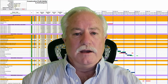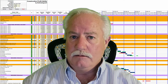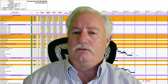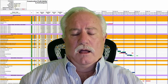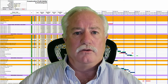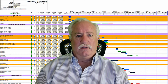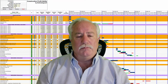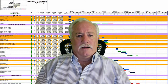However, we need you to understand that, if any revisions in the drawings come along, or if we get out on site and encounter any site-specific conditions that are going to require additional or different material, we want you to guarantee us the same pricing for those materials. We're not going to pay a premium because we changed our package. This is the markup that you're going to charge us through the entire project for all the materials in this classification, whether it's pipe and wire, light fixtures, switch gear.